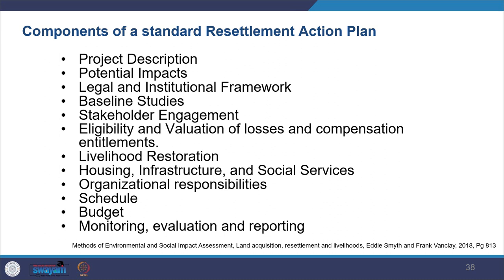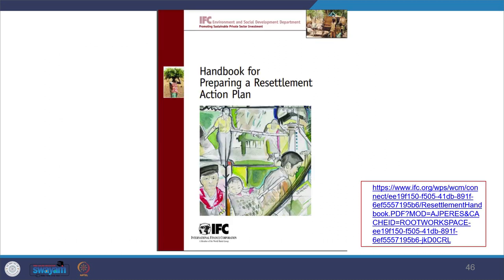And what kind of organizational responsibilities, so that you can show that whomever you are giving the charge, they are capable of handling this. And what will be the schedule, what will be the budget, and what will be the monitoring, evaluation and reporting system. That would also involve how the community will be engaged and how you will take care of the completion audit when you hand over, how you're going to undertake the audit about how the targets have been achieved or not. So you may also revisit all the available frameworks in this regard.